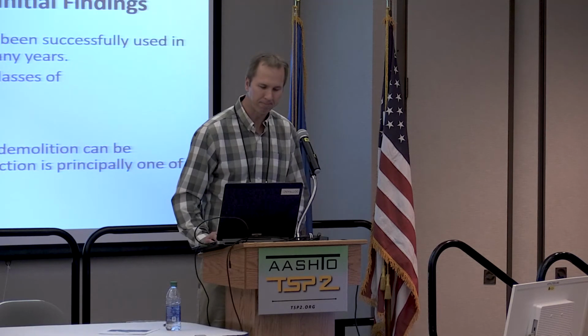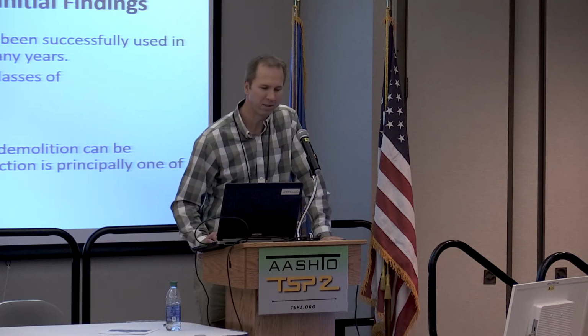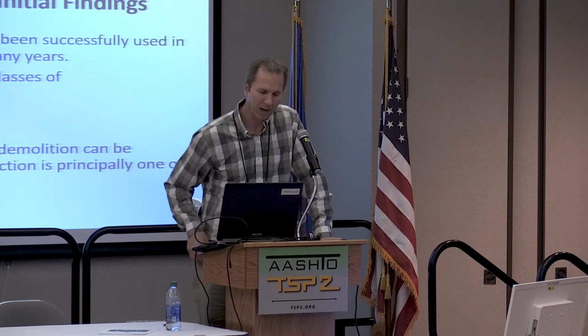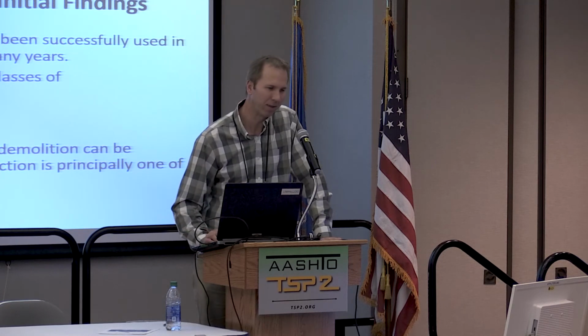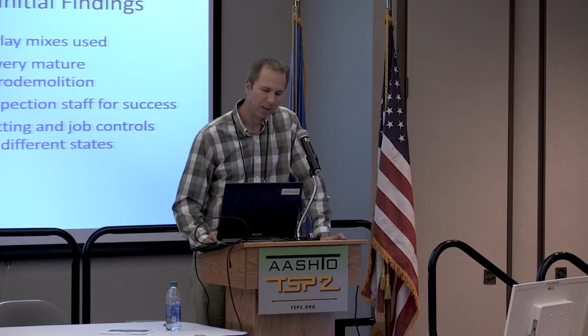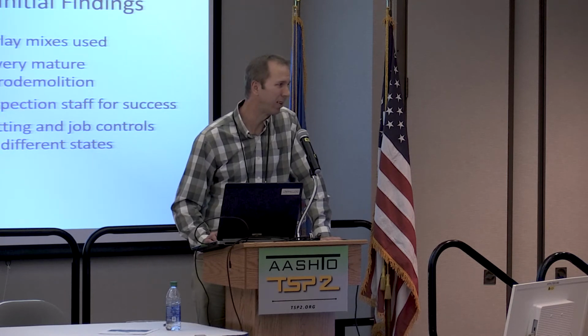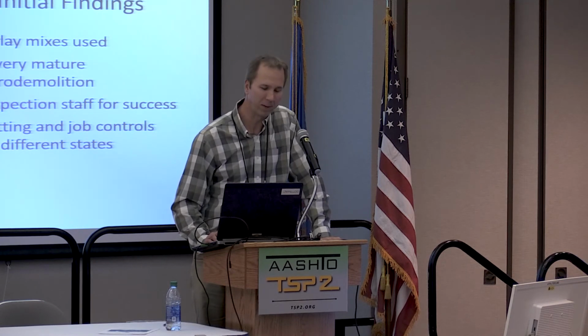experiences to the presentations. So we've got some very basic findings to distribute at this point: hydrodemolition has been successfully used in multiple states for many years. And there are two classes. You've got shallow removal or deep removal, just to keep it simple in terms of how we treat the deck. Both classes can be effective, and the selection is principally one of economics. Do you want to go deeper or shallower? There are some cost benefit differences between them. We also found there's wide-ranging practice in what repair material you put back and what overlays are used. Multiple states have used this for many, many years, over 20 years in some cases, and some states are doing it as their standard.